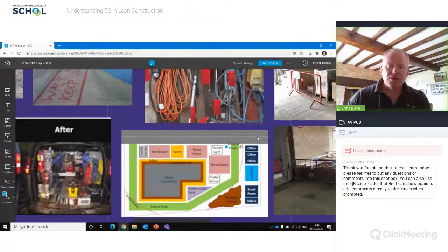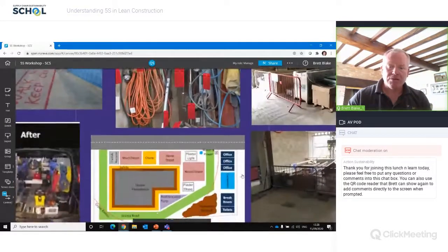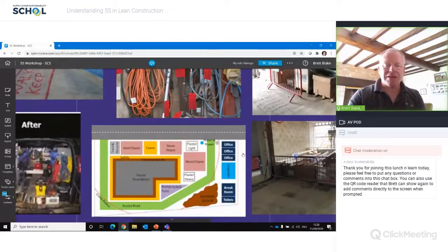As we start to go through our 5S, think about how we lay things out. So do you need to look at a schematic of what that new area looks like, where the different zones are for the different materials, how we're segregating people from exclusion zones, for example. So think about your 5S, not just the physical, how it looks, but what do you need to have in place as a standard that people can see and understand?